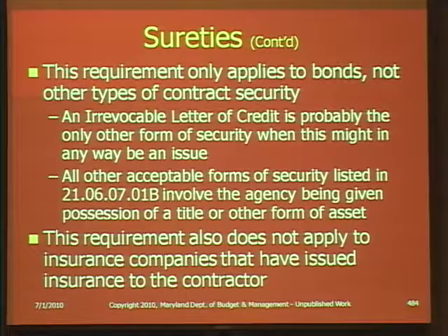Only applies to bonds, not, okay. This requirement to provide notice to the surety only applies when there's a bond, not to other types of security, such as insurance, such as an irrevocable letter of credit, such as liens, things of this nature.